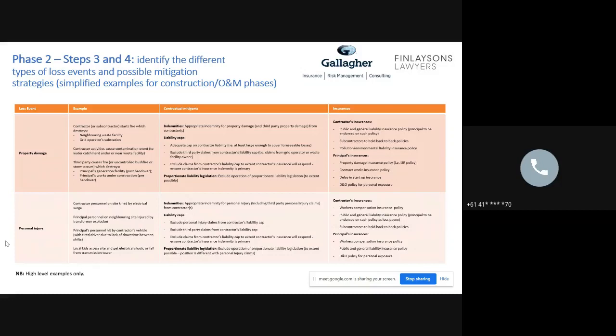So first of all, indemnities, just to explain what that means, there's always the issue that without your contract in place assigning risk, the way that the law will interpret your risk is based on who's the relevant party who's had the duty of care and done something that's wrong, and something that's foreseeable, rather than something that might have happened due to a neutral cause.